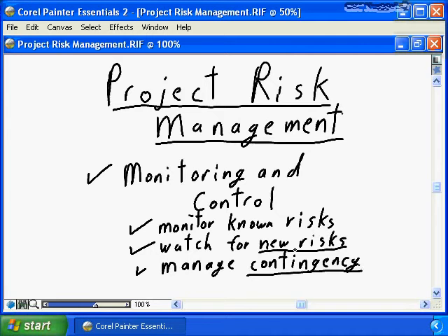The contingency is reserved for the true risk event, and only after the risk events have transpired, only after you as a project manager feel that you have complete control of the risk situation, can you actually provide relief to project deviations from your contingency fund. The key to contingency is ensuring that if you put the contingency aside for risk events, the contingency is preserved until the risk event happens.